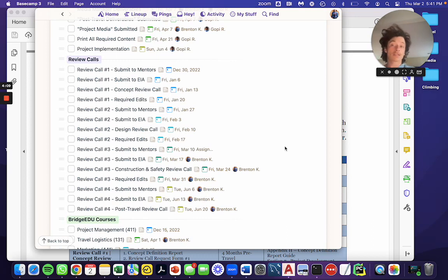Now, you would want to submit to EIA. We can work back from required edits. So each call you have 1 week to complete all of the required edits. So say you want your review call 1 to be completely done by January 20th. We want to make sure we're having the call January 13th so we can give ourselves that 1 week leeway to get the required edits done.